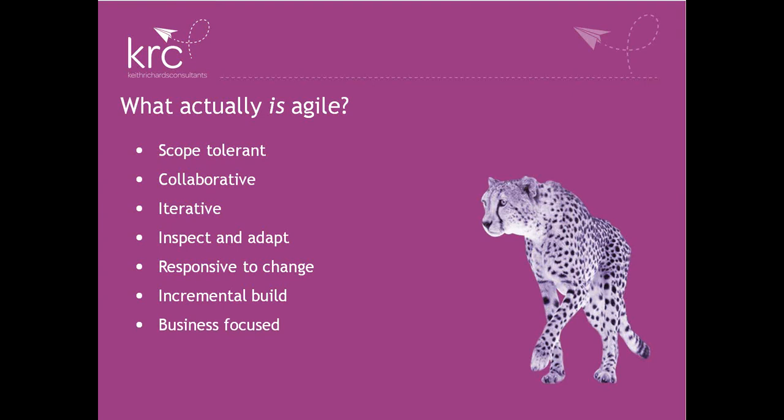If you're getting your Agile to work really well, you're well engaged with your customer. This is where certain methods like DSDM are very powerful. They have sort of 4 or 5 business roles in how to link into the business. Some Agile methods only have one, called product owner. There are limitations there. There's risks to just having one single point of contact. But the main thing you have to do with Agile is you need to embrace and engage with the business. And that doesn't mean engaging through the documentation. It means engaging with the actual people.